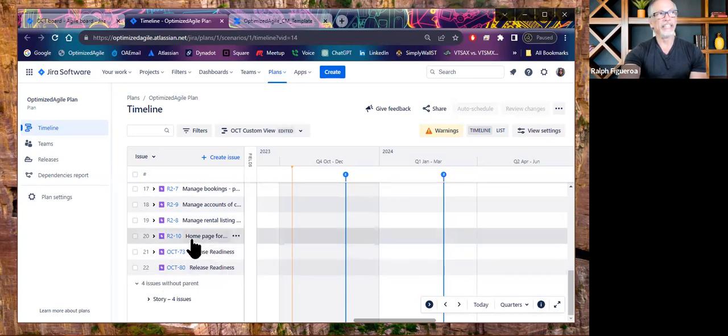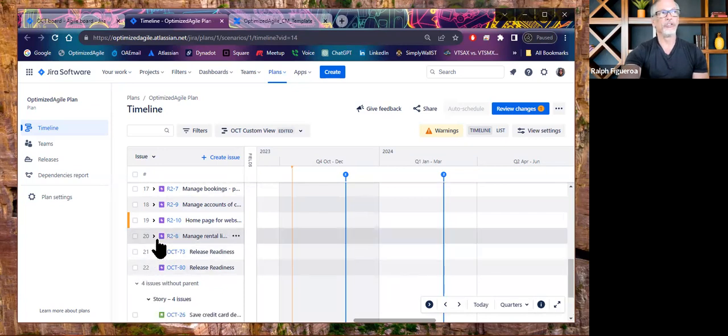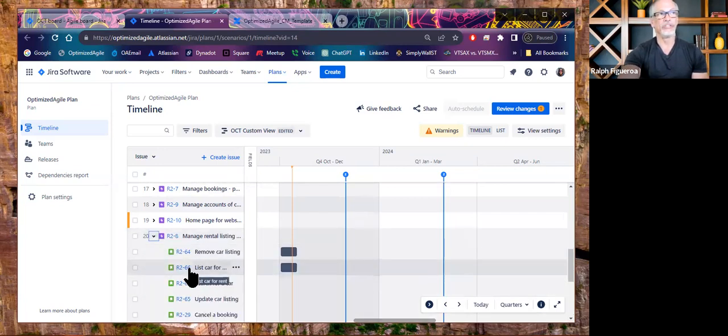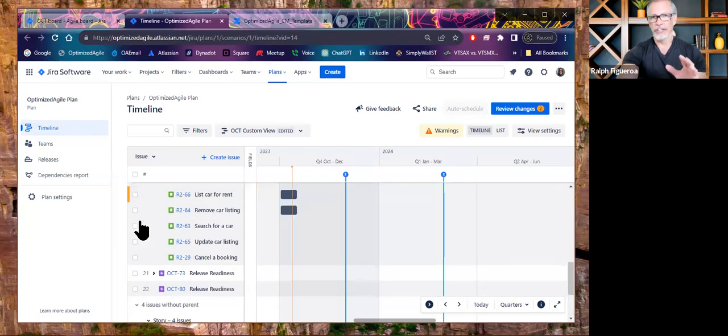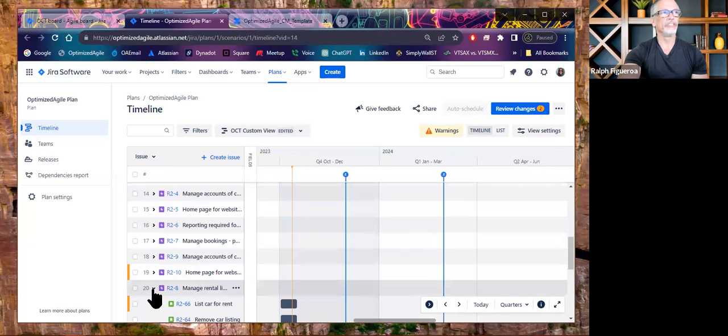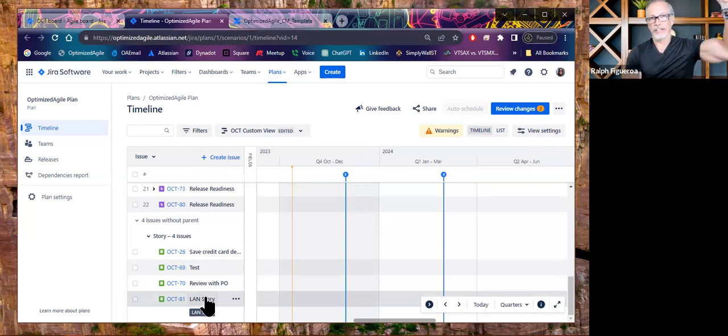Nice thing about this is that you can also, from within this section here, do ranking. So if you're a product manager and want to rank the features, or if you want to rank at the story level, you could do that as well from this view and rank one story over another. You have the ability also to see what I describe as orphans, which is at the bottom of, I'm going to close this epic here. And orphans are stories or tasks or bugs, those issue type levels that are not bound to an epic, to a parent.